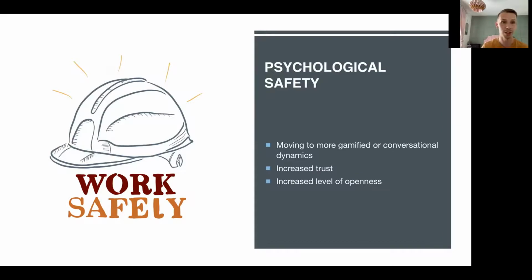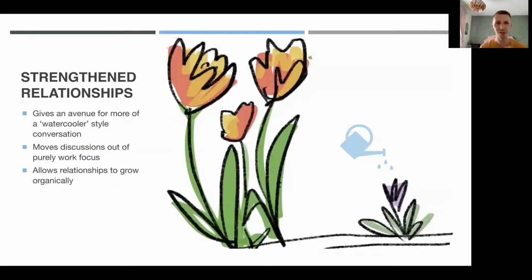So if you go to the next slide for me, Alex, I've already touched on this a little bit around building relationships and allowing them to grow organically. So making use of things like 1-2-4-All, where I try to mix up the facilitation style, so people aren't just dumping post-it notes on a wall or on a virtual whiteboard. I might give people a minute or two of silent reflection, because then every single person gets to contribute. I then pair people up for a couple of minutes to build on ideas.